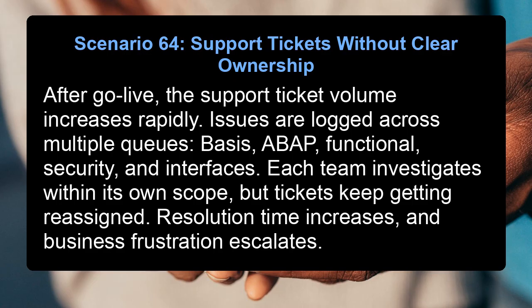Scenario 64. Support tickets without clear ownership. After go-live, the support ticket volume increases rapidly. Issues are logged across multiple queues: basis, ABAP, functional, security, and interfaces. Each team investigates within its own scope, but tickets keep getting reassigned. Resolution time increases and business frustration escalates.